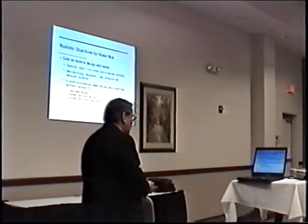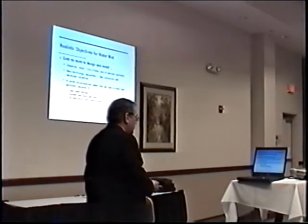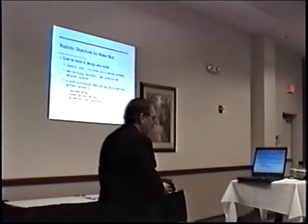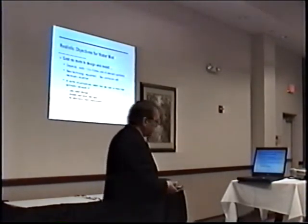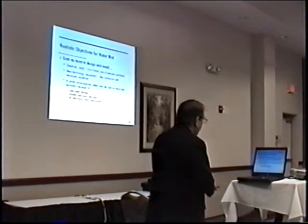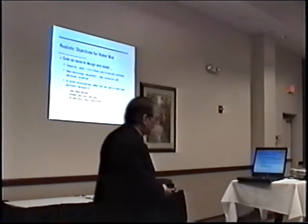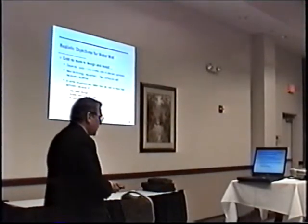What about cost? Well, no way. The costs are 3 to 4 times that of standard sprinklers, and that number keeps changing depending on which job you're talking about, the details. They're not going to be competitive. At the present time, water mist is not competitive with standard sprinklers except under rare circumstances.